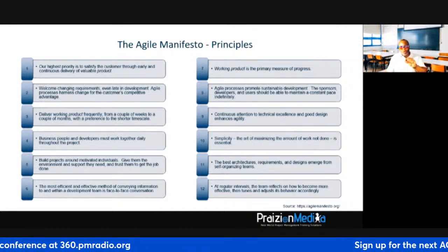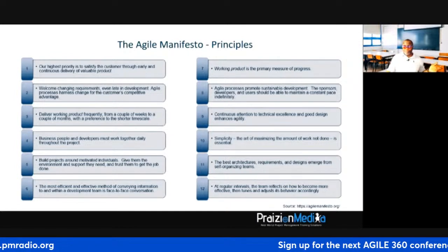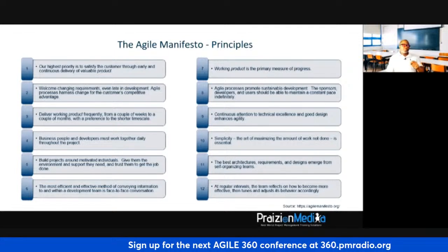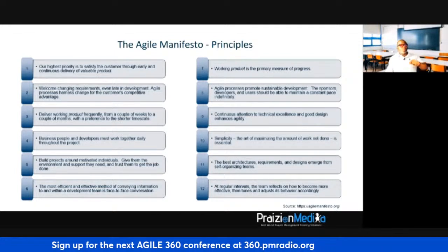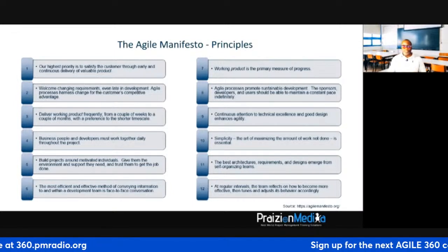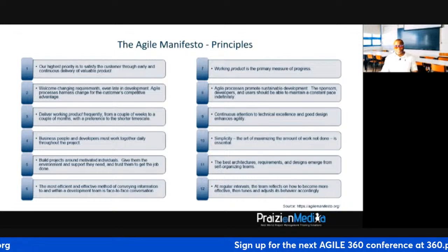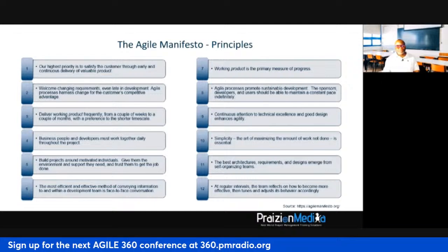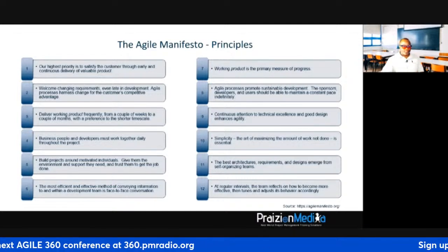So you look for one or two, or maybe more items that you can improve on. Those could become backlog items for you to work on for the next sprint. And in the next sprint, you take account: these things we were working on, did we really get better in our process? Did we improve? Questions like that. So it's more like an unspoken retrospective. Does that make sense? Yeah.